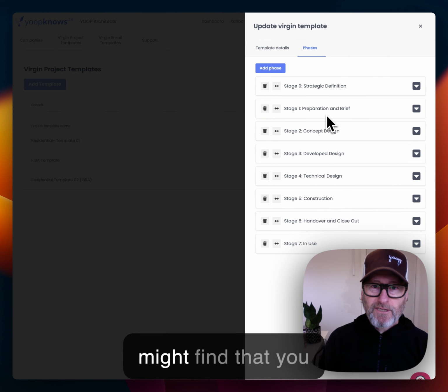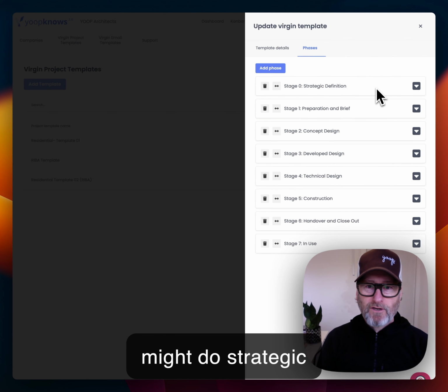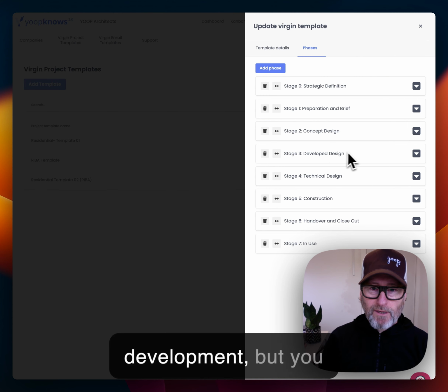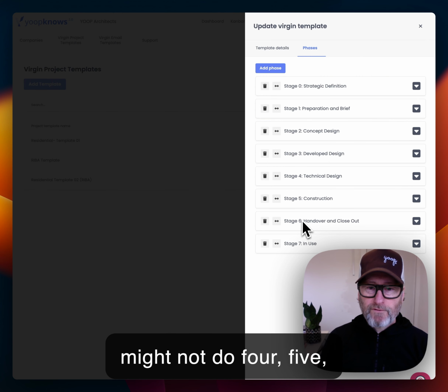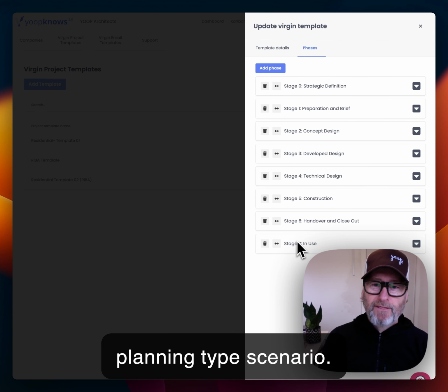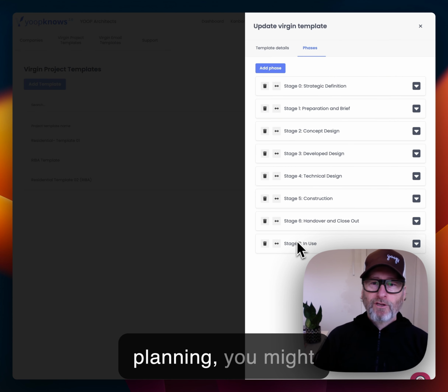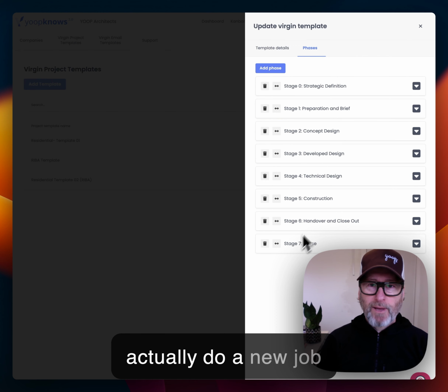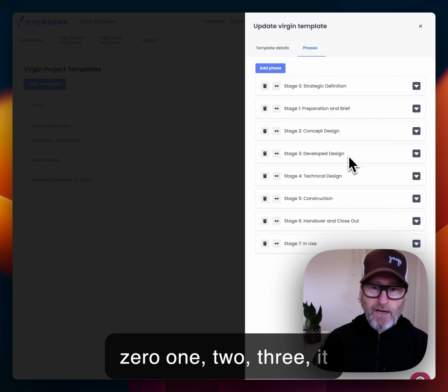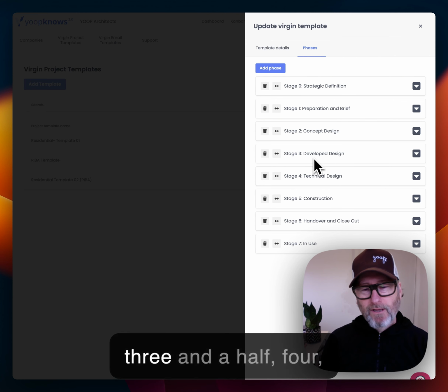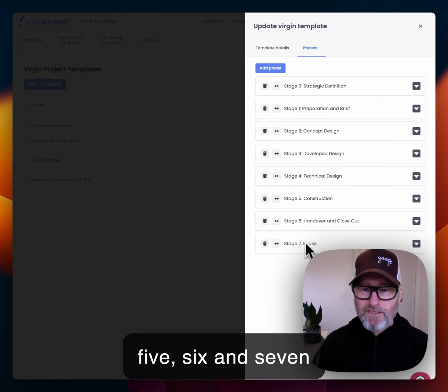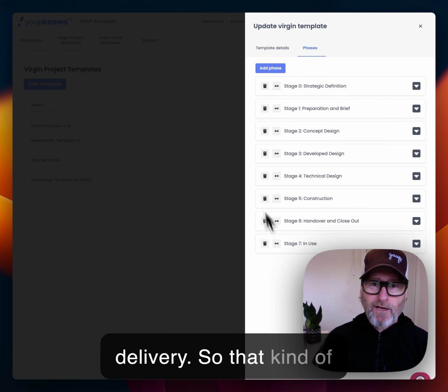because you might find that you do strategic definition, preparation and brief, concept design, design development, but you might not do 4, 5, 6, and 7 because you're just doing a planning type scenario. And then once you get planning, you might actually do a new job, and it might not have 0, 1, 2, 3. It might have more like 3.5, 4. Well, it might have 4, 5, 6, and 7 because you're doing delivery. So that kind of thing.